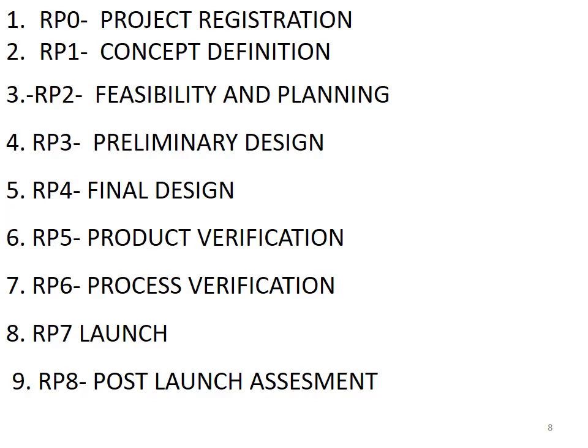prototype, test beta prototype for robustness and reliability, finalize bill of materials, means whatever the materials and components we need, we have to make a list, develop manufacturing control plans, how it is to be manufactured. So we make the detailed plan for each and every operation, identify long lead time items, and prepare patent applications. Then we go for the product verifications.